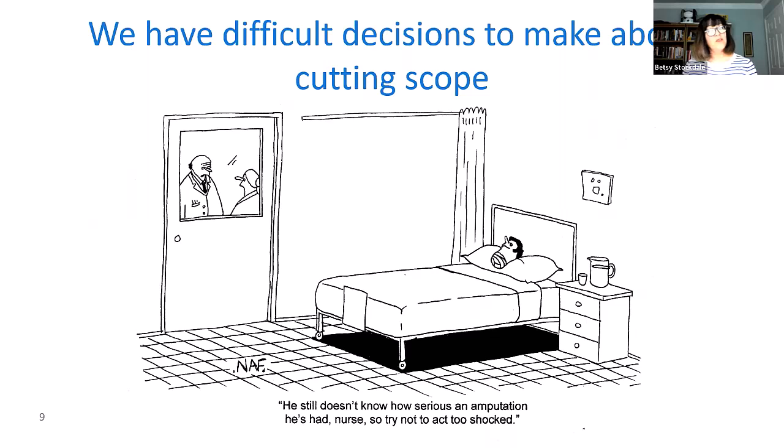Both have a positive return on investment, so we should do both, right? No, not so fast. We would suggest that you only focus on the $20 million one to reduce your risk of them both failing. And to sum it up, this is all really about hard prioritization choices, really based on value. So we're literally cutting projects to the bone.